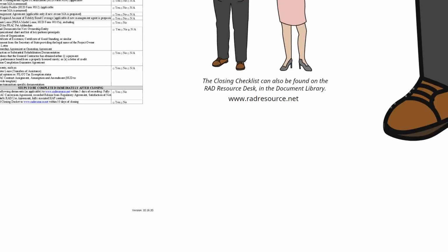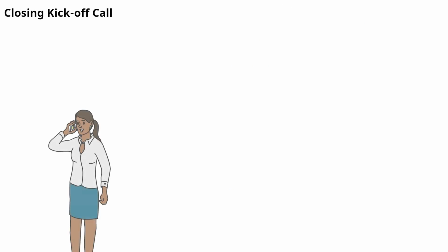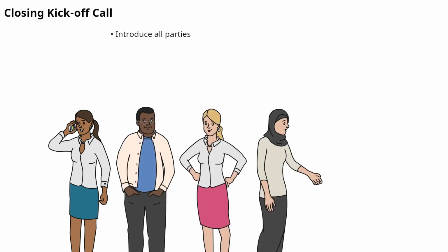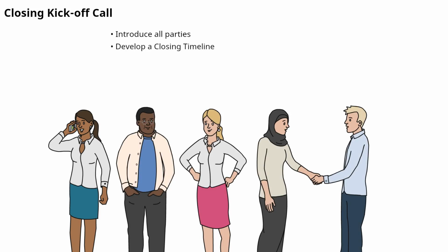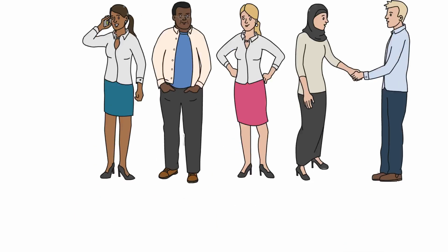Once the owner has provided information regarding their availability, the closing coordinator will schedule and conduct a closing kickoff call. The purpose of the closing kickoff call is to introduce all parties to the closing, develop a closing timeline, explain how to submit the closing package, discuss any special conditions, and answer any questions that the owner may have.